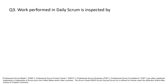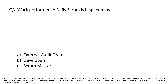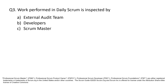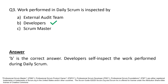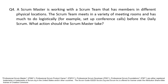Question 3. Work performed in Daily Scrum is inspected by: A. External Audit Team. B. Developers. C. Scrum Master. Option B is the correct answer. Developers self-inspect the work performed during Daily Scrum.